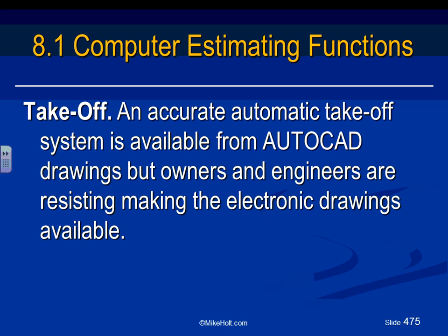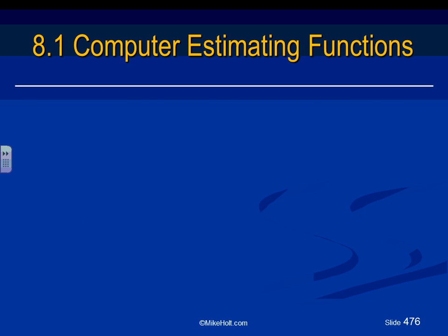Any comments, guys, about the AutoCAD or on-screen takeoff that they use? The problem with AutoCAD, guys, is you go to Michette Cooley Erickson, their symbols are different than Hallberg Engineers. So if your project is done by an engineering firm, it's a lot of work to re-identify all these symbols in the software. But if you have a design-build and you have your own symbols, Jeff, and you can input it directly into the system, make your designers use the same symbols that the estimators are using in the software, that will be a very fast way of doing takeoff.